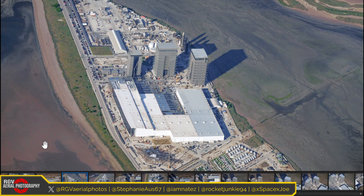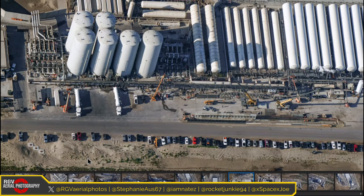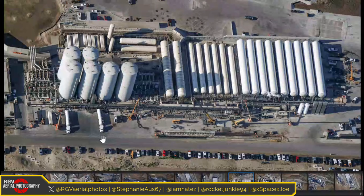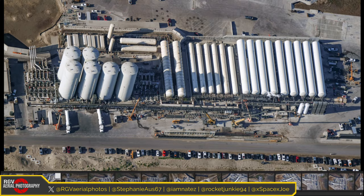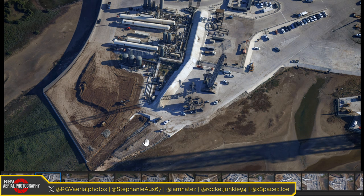All right. Starsoon: how long does the wick draining process take to complete? So they say 6 months at least, I think, but that's just with the normal piling the dirt on top. SpaceX may try and do something to help accelerate that process, which I wouldn't be surprised if they do, because like I said earlier, they will want this second orbital pad online sooner rather than later. So they could try a few other things to get that going quicker.